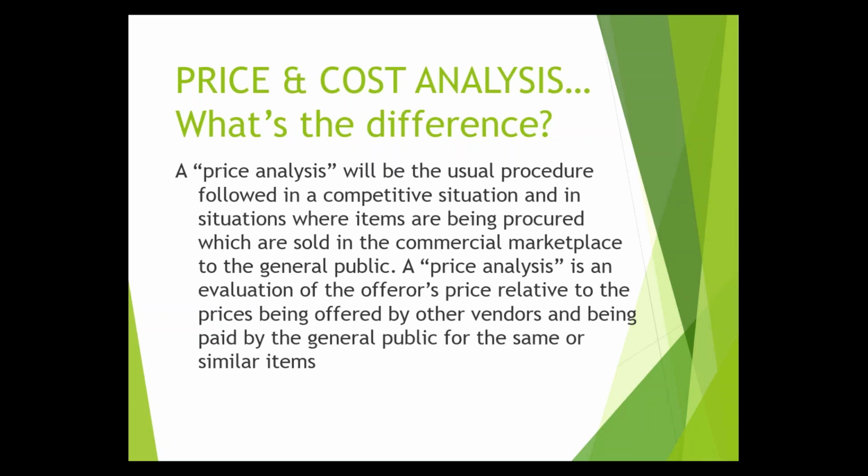So when I say the product must be a commercial product, that means one for which there's a basis of comparison in the marketplace. Price analysis would not be suitable, for example, for research and development items or for one-of-a-kind items for which there is no basis of comparison. It's not necessary that competing products be exactly identical to the product being offered, but you must be able to compare the product's capabilities and their respective price differences in light of varying capabilities.